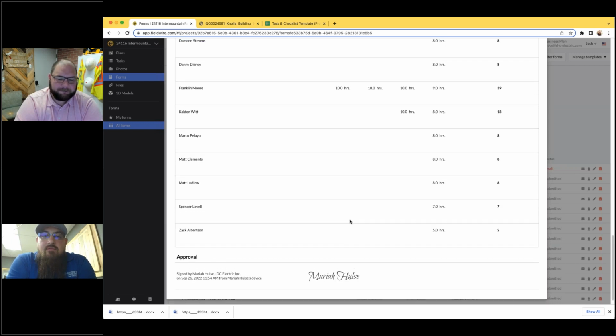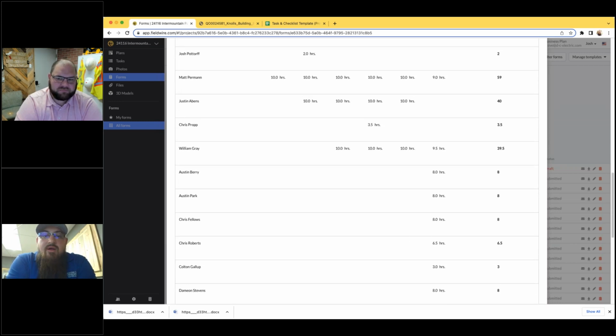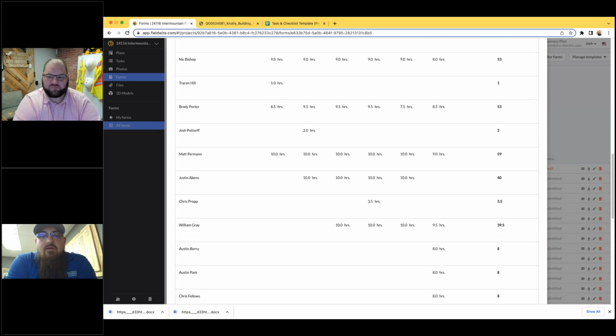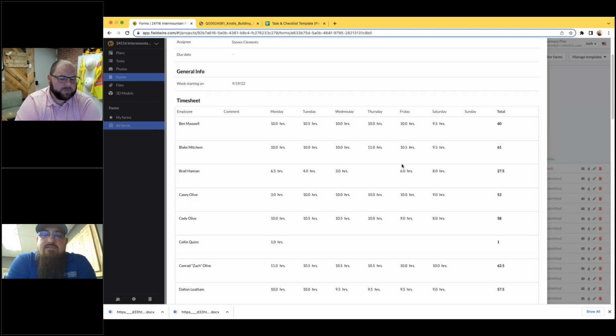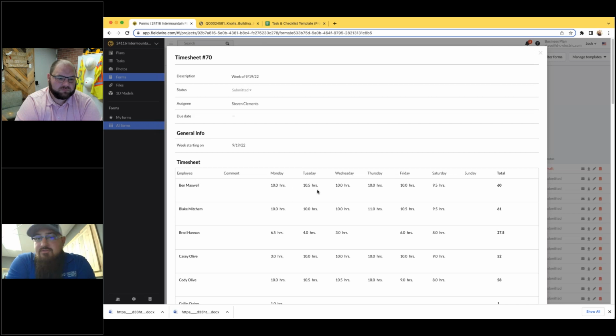Nope, actually our office manager goes through every Monday and updates the time for the guys who are on the job from their individual timesheets. Because the way that we work things is every employee at DC Electric has a project of their own, and they have a specific timesheet in theirs. And so we take from those and transfer it to this so that there's just a project timesheet for every week.